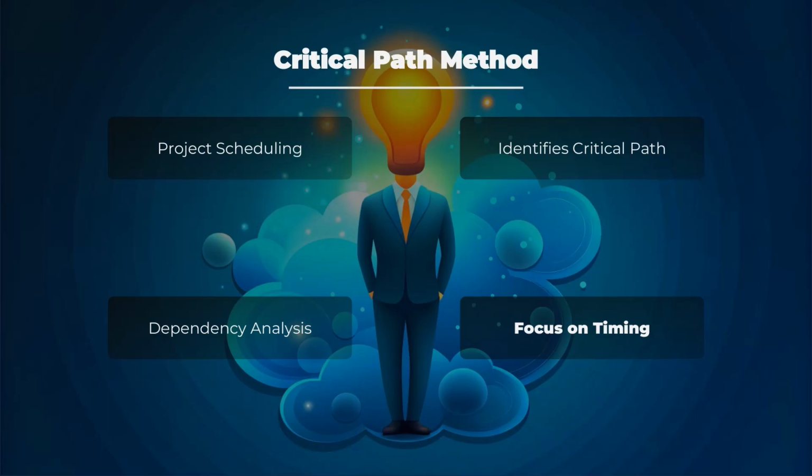Focus on timing. CPM places a strong emphasis on the timing and sequencing of activities. By determining the earliest time each activity can start and finish, as well as the latest time it can start and finish without delaying the project, CPM allows project managers to create an accurate schedule that optimizes project timelines.